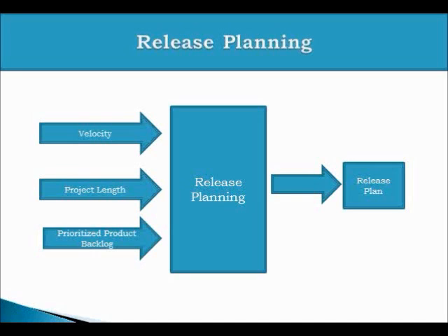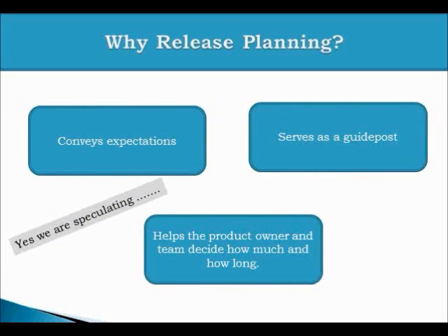But are we forgetting that in Agile we welcome change rather than following a plan? If we know that everything is going to change, then why do release planning? Because release planning helps us in conveying expectations. It helps a business to communicate with the team what they are expecting after 6 months. It also helps teams to communicate back and explain what is possible in 6 months.